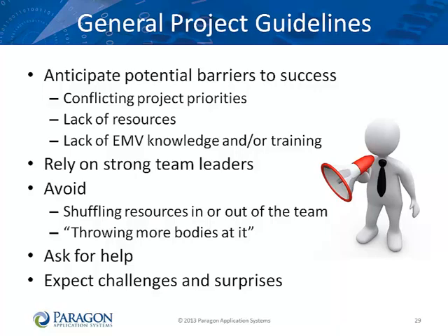It's hard to find people with EMV experience, so you'll have to invest in training. Rely on your strong team leaders. Do not think that throwing inexperienced personnel into your project will help you meet your dates. With a project this complex, with new technology, it's really hard to bring new people into the team midstream and expect them to be immediately productive. In fact, this can have a negative impact on the team since current team members will have to train the new people. Nobody can know everything. Don't be afraid to ask for information and for help.